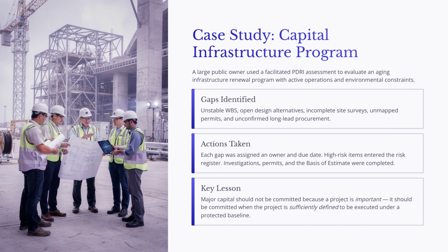The key lesson is simple. Major capital should not be committed just because a project is important. It should be committed when the project is sufficiently defined to be executed under a protected baseline. That is the central purpose of scope definition and PDRI in front-end planning.